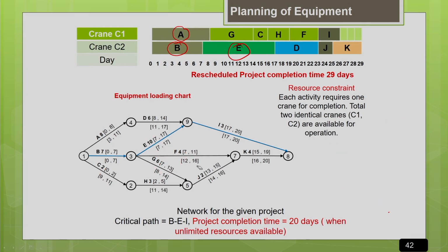So now let us mark which are all the activities completed. A is completed, B is completed, okay, E is completed. Okay. So now after A, we are going to see the allocation. So which are all eligible after A? Obviously your D is eligible for allocation. Then F is already waiting, ready for allocation, G is ready for allocation, C is also waiting for the allocation. So now let us see, D, F, G and C are ready for allocation.